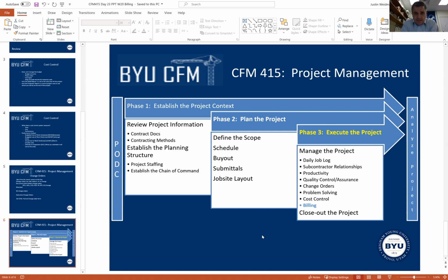In the 2008 recession, that's what ended up happening to a lot of contractors. They kept working and they weren't getting paid, and all of a sudden they were financing the project and they ended up going out of business, because they continued to work with the promise from the owner, "Oh, we'll get you paid, we'll get you paid," and they just kept working without getting any payments back in. And so that's a challenge that's going to be facing the industry